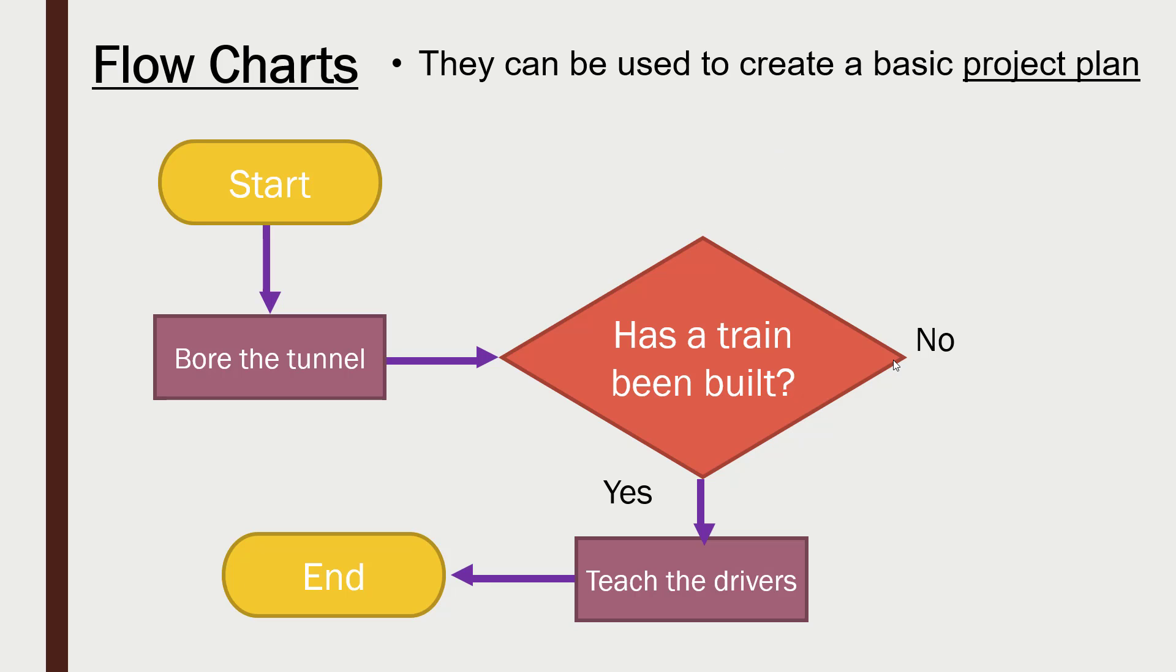But if we have no train built, if the answer is no, we need to go and do another task. So this one being actually building a simulator so they have something to practice on. Not as good as an actual train, but at least they've got something to practice on. So the key bit really is how we're using the symbols.